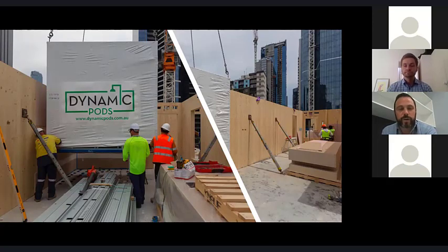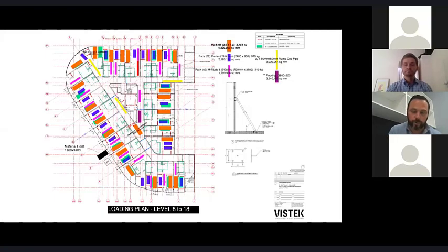In addition to that, we were running bathroom pods. So it's something that needs to be considered. And when I referred back to the Brock Commons image, you couldn't run with those loading bins at one location every floor. You would have to pull the materials in from there and then maneuver them in the corridor through the door, and you'd have to manage that very, very difficultly.